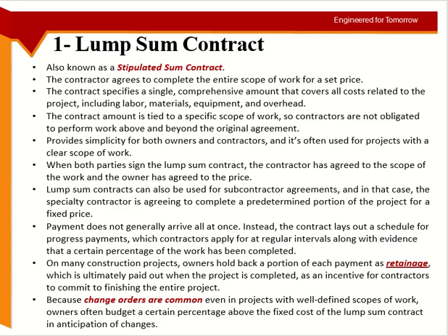Maybe you are saying I have done 100% of the work, but I will give you everything except this much amount. It could be 5%, 10%, whatever you agree, and this will be paid after the client is completely satisfied and has checked everything.